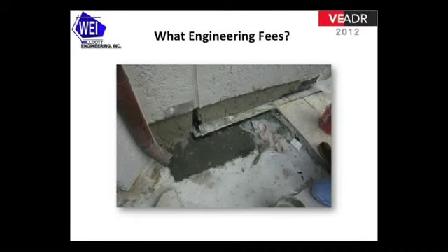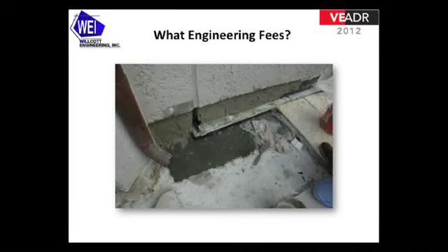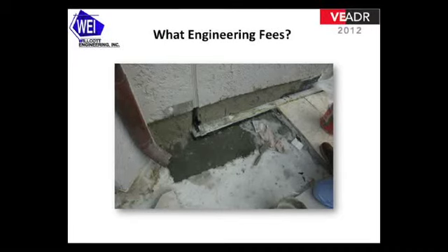Field engineering was then spent during the process of repairs to evaluate what specific tie-ins were needed and what corrections were needed in the work performed. Further, at the completion of that, the municipality changed its mind and required an engineer to sign off for the work. We call them special inspectors, but they are engineering or architect involvement. Fees were spent to accomplish that by paying a professional to look through field photographs, material submittals, and do site observations of the work that was completed.